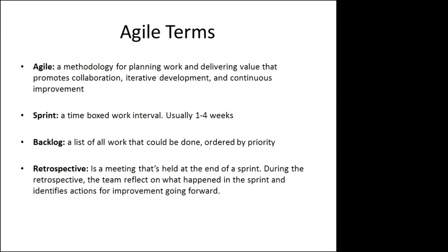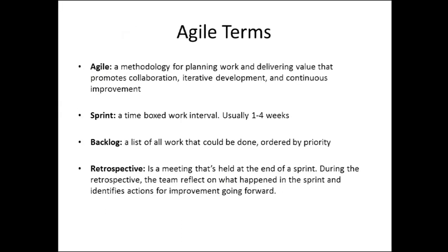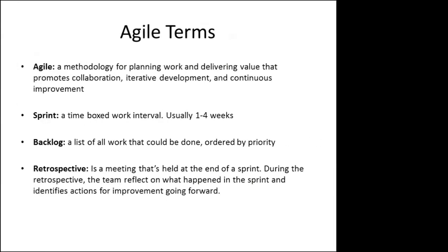So if you have additional questions, additional requirements, or additional material that needs to be done, that's in your backlog. But the sprint backlog is the to-do column. And then in your sprint, you're going to try to get as much of this, preferably all of this, over to done.